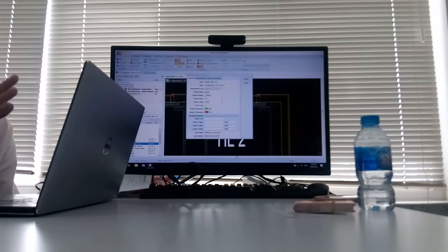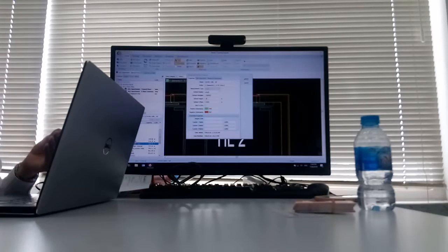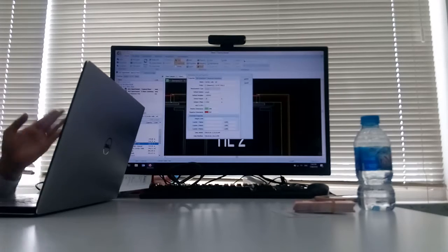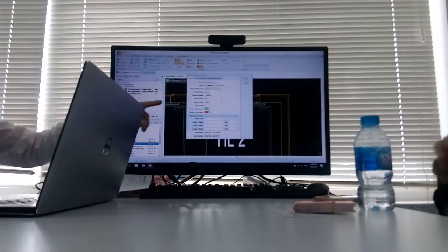The software will never show it, because as you mentioned, I overlap both drawings. They do not show the different floor height, but the engineer or any notes still specify that this floor height is reduced. So you need to find anything related to the wall finishes or the wall height, and change the default height.